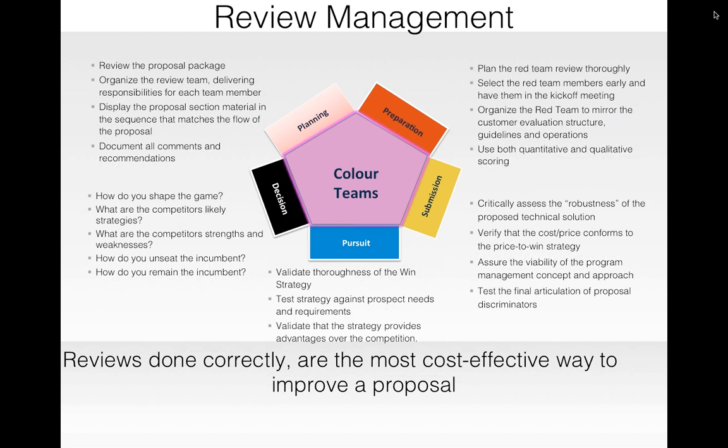And the goal team review will always assess it from the cost perspective, whether the cost and the price which you are proposing is in line with the price to win strategy which you had developed during the capture phase, and a most likely price range, whether it is falling within the most likely price range or not, or is there any other alternative. So it will also review the risks and the cost of the risks in the entire proposal if it converts into an order.